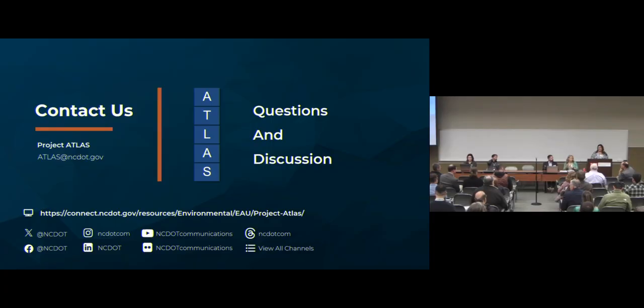And so you, as the subject matter expert who's completed that, will load that there. Everybody else can see it and see the date and the time. Now, let's say something happened. You're like, I loaded the wrong one. Or the project went on for a couple of years and you had to redo something. You'll go back in there and load the new one, right out in the same place, hit browse, load, and you'll see the latest.